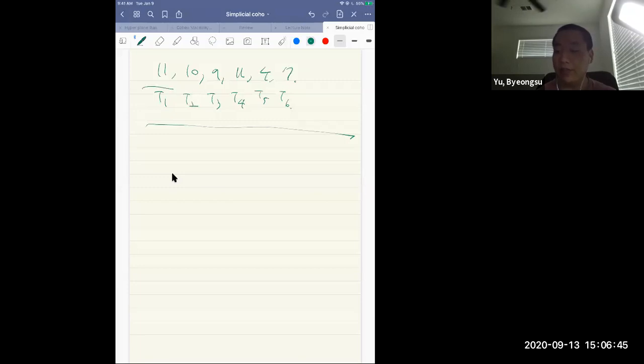To make the decreasing time scheduling, you need to figure out which one is the biggest. The biggest ones are T1 and T4, which take 11. If you have a tie, just put the lower index task first. So in your priority list, T1 should be first and T4 next. And we have already done those, so just delete T1 and T4.